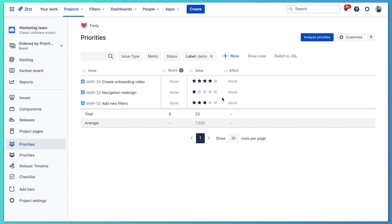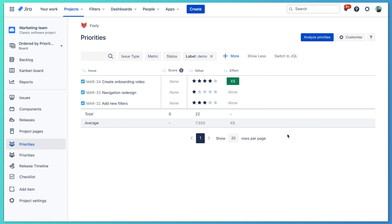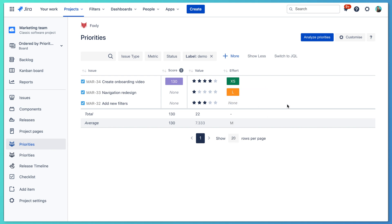Now we are done with assigning value and it's time to assess effort. Onboarding video is going to be quick — almost no coding is required and it will be done fast, so it's XS. Navigation redesign is L: in this task we need to get design involved, carefully test designs, build new navigation, and also rewrite documentation. Adding new filters is medium.